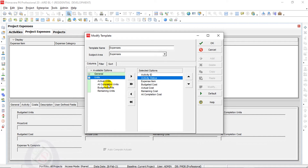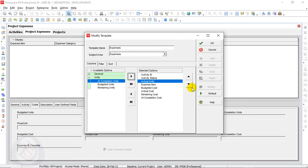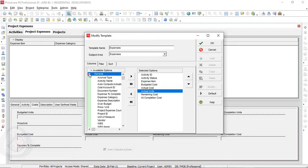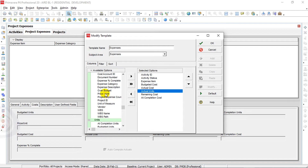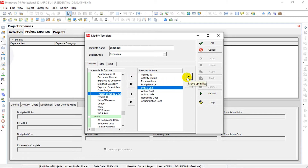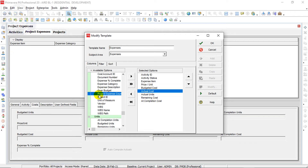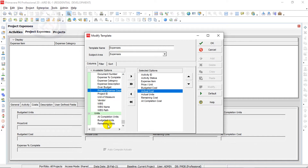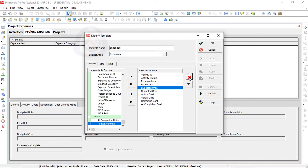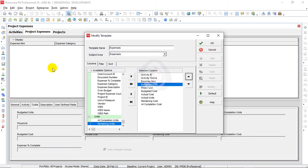I will also add Actual Units under Units, and under General I will add Price Per Unit — this is constant when working with expenses. There is also a missing Budgeted Units field, which I will add after Expense Item. Budgeted Units multiplied by Price Per Unit gives you Budgeted Cost.